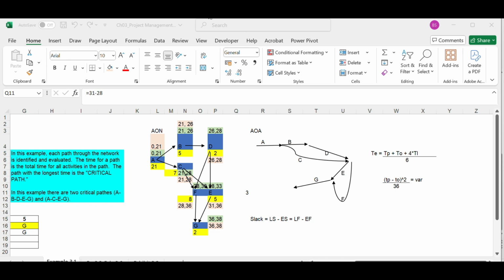Now, another problem that can occur during the project duration estimation is queuing. The remedy for this problem is to have a staggered project start delay. That is, don't start many activities at the same time. Adding proper resource buffer and resource leveling techniques will help you navigate the queuing issue. Multitasking can be another problem that can be remediated through proper prioritization of projects and carefully authorizing the start of non-critical activities.